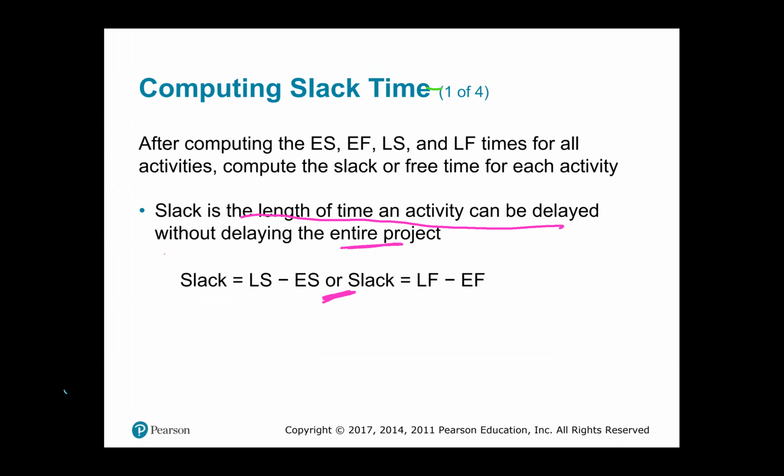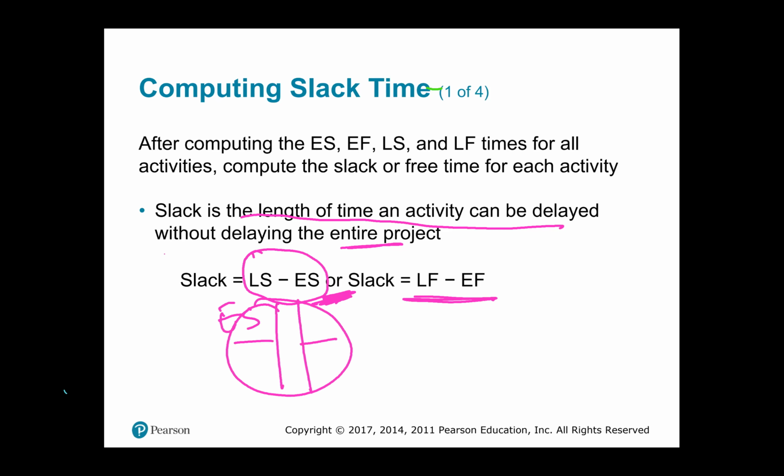Now notice you can use either a pair of late start minus the early start or late finish minus the early finish, right? So let me just give you the visual. Remember, here is your early start. Here is your late start. Here is your early finish. And there's your late finish. So you can use either that pair or this pair, right?